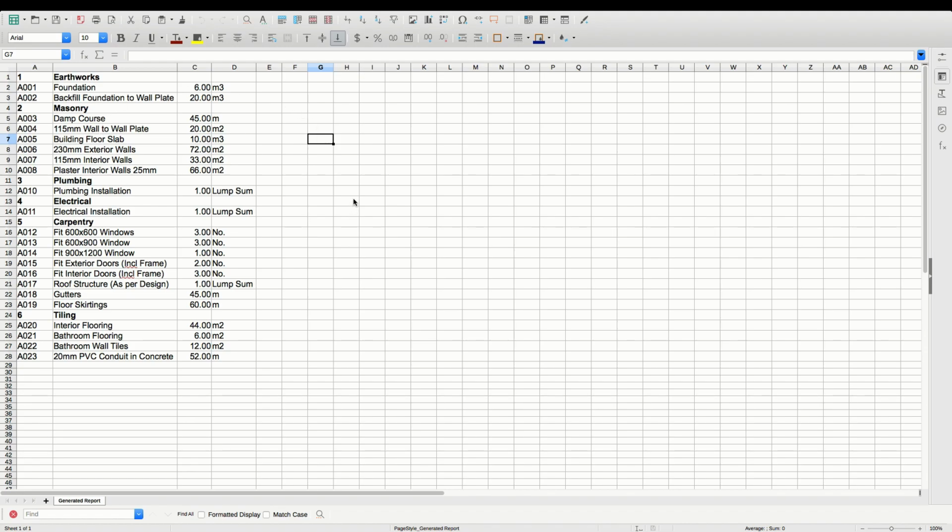So here we've got a rather typical bill of quantities with an item number, a description, bill quantity column, and a unit of measure. And Lula Build allows you to directly import this bill of quantities into the platform. And when you upload this file for importation, Lula will ask you to identify the columns as a first step.